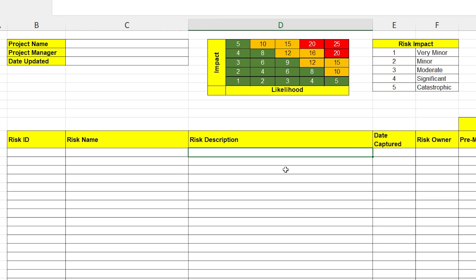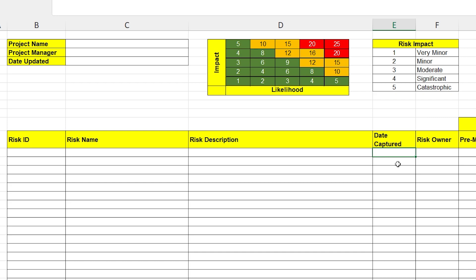The risk description is where you actually put the description of what the risk is, its cause, and its impact. Try to be concise. Try to get to the point. I have other videos on the channel about how to write good risk descriptions. You should really go and check them out. Next, you want to include the date the risk was captured. This is really helpful for determining how old a risk is, how long it's been sitting on your register for.